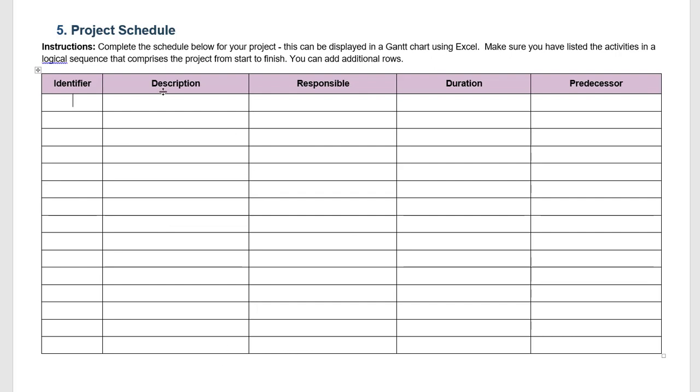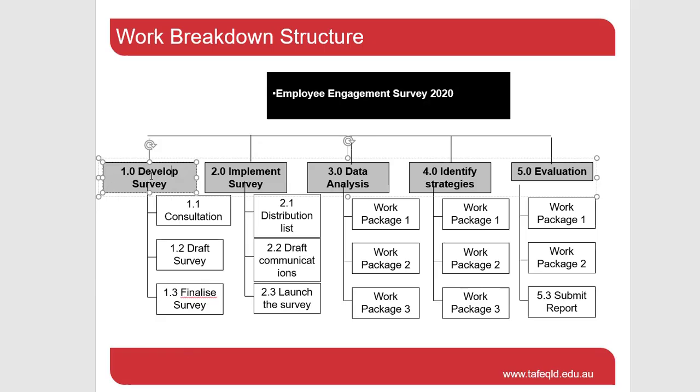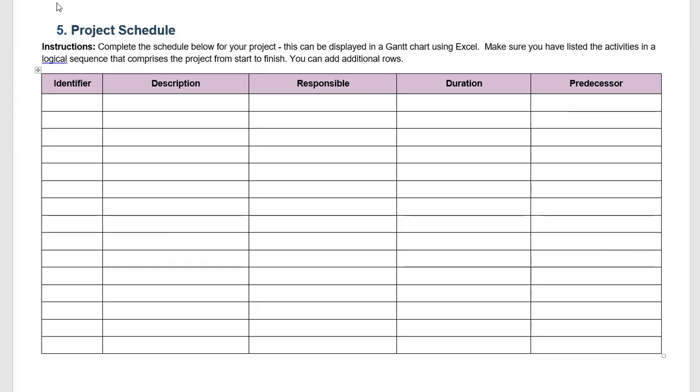So going back to our template we have an identifier. The identifier is the coding on the work breakdown structure. So if we go back, the first coding is 1.0 and the activity is to develop the survey. So here we put in 1.0, develop survey.